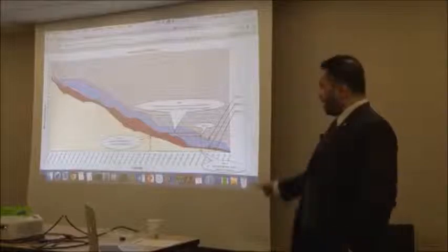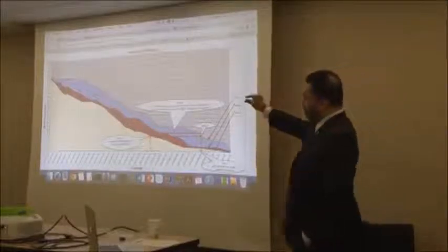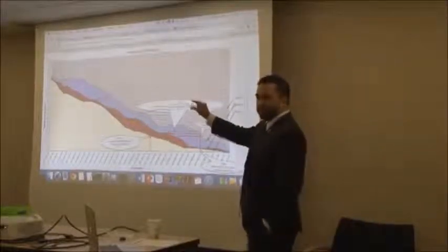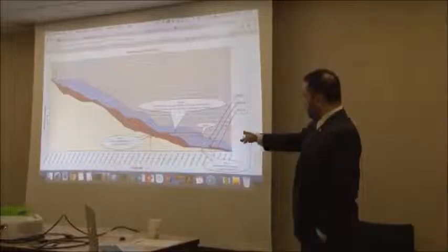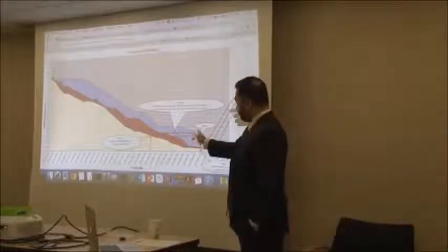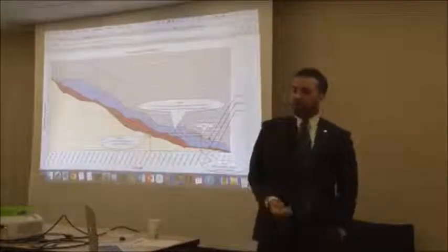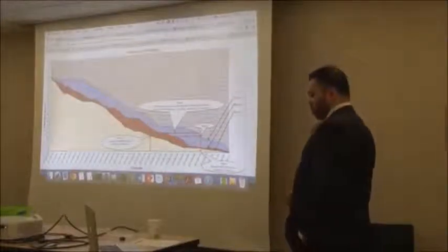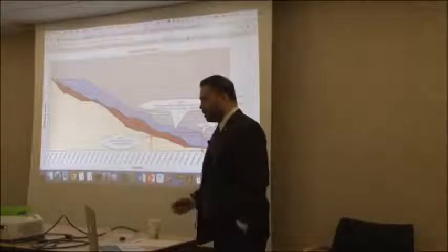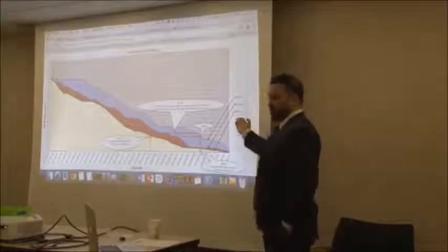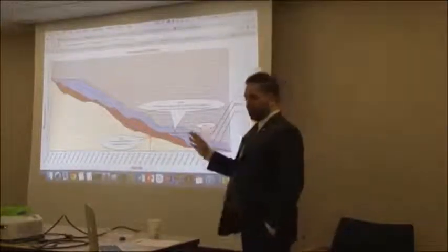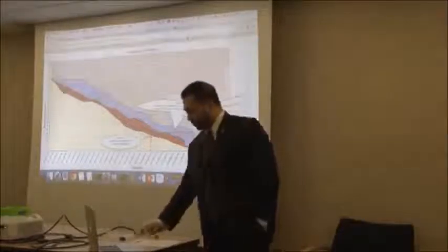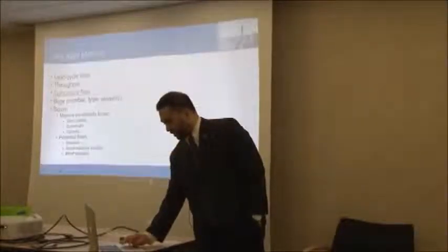You want to be able to see how wide or how narrow these little zones are. You can also, by drawing some lines across the graph, figure out your average throughput, your average lead or cycle time, those kinds of things in cumulative flow. And these are very basic categories, you know, to do, doing, done. It could be whatever you want, the kinds of features, etc. However you choose to categorize.